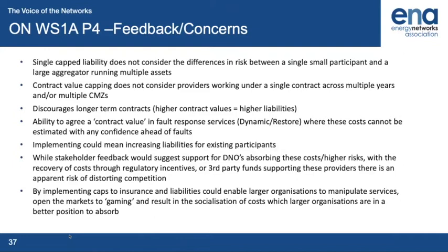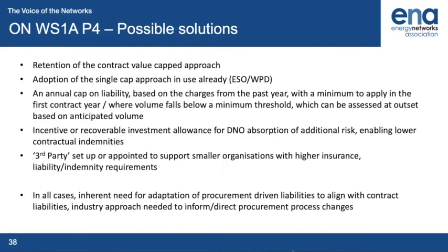We also have a difficulty in some of the service types to actually agree what that contract value is. So if we're implementing some of the fault restoration or post-fault services, at the onset we're putting these in just in case we need them. So the value of the contract can be estimated maybe based on faults that have been experienced in previous years. However, they may not actually reflect the overall value of the contract once it's been in operation for a period of time. And we may well be asking for liabilities far in excess of the value of the contract after its year of operation.